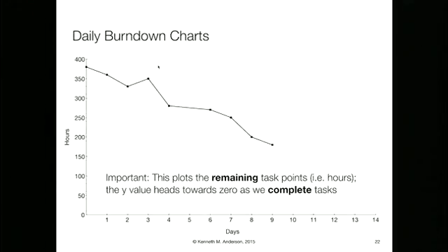So does a team then get back together and re-estimate, or do you do it individually, because you're working on that task and you realize that, just wait? It can happen by an individual developer going, whoa, I was supposed to be done by now, I'm not done, it's going to be another 4 hours. So they just change it in the system, and if you're using a system like Rally software, you can go into your assigned tasks and change the estimate, and then it will percolate to these graphs. Or you're doing it the manual, labor-intensive way on a whiteboard. The developer gets up from their desk, walks up, changes the estimate in front of everyone. It's like, hi guys, I just realized, that kind of thing. It could just be conversation among people and someone updates it, but yes, you update it midstream.